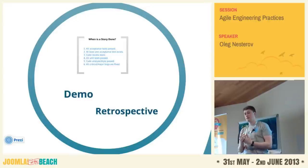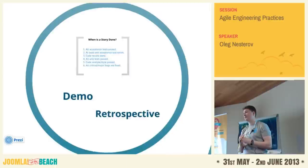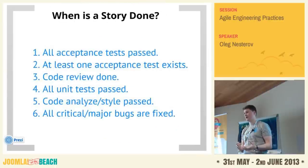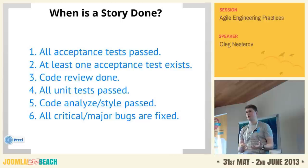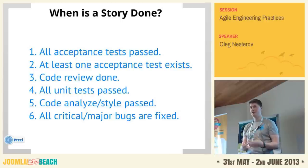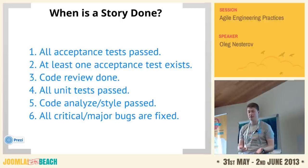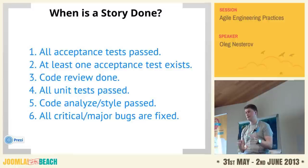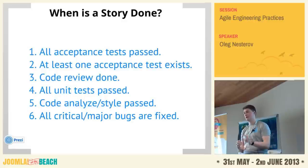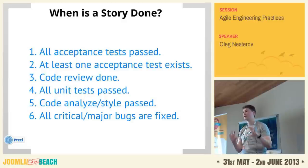When the sprint is done, you can do a retrospective meeting — a very powerful thing. You sit together with your team and think about what you can do better next time. Each member can say what was done wrong and what they'd like to see in the next iteration. Do this every two weeks if you're doing two-week sprints. A story is done when all tests pass, you have at least one acceptance test, code analyzers and style checkers pass, and all critical and major bugs are fixed.